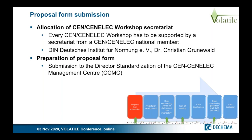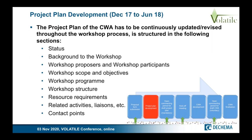In the first instance, you need a secretariat for your workshop, and this is in principle a CEN-CENELEC national member. We asked several national members of CEN-CENELEC, and finally the decision was going to DIN and Dr. Christian Grunewald, and as I said, he's here and will introduce what happens afterwards. Before starting, you need to prepare a proposal form, and this proposal has to be submitted to the director of standardization of the CEN-CENELEC management center, where it is then justified for the next steps. And then the next step is the project plan development.